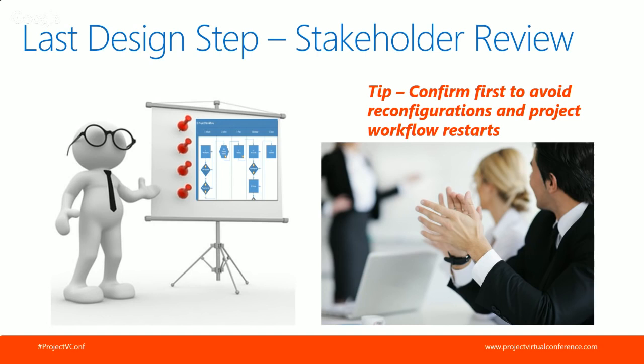And just another note here: if workflows are already running and in process and you make a change, a lot of times those changes require you to restart all the projects. You can restart them back to their current stage, but restarting workflows causes them to lose their history, so it essentially looks as if they entered workflow on the day you restarted. So a long way of saying, try to get the design confirmed before you start developing.